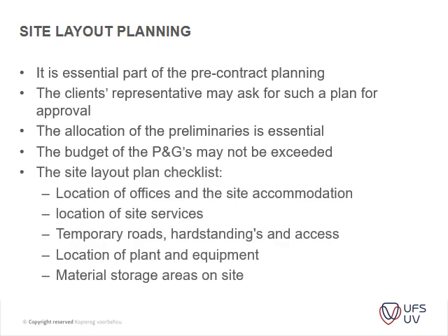And then just on the P's&G's, that's very important, because this is where most of your profit will lie, within your P's&G's. The quicker you're off site, the more profit you will make.